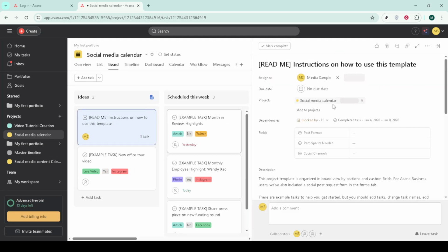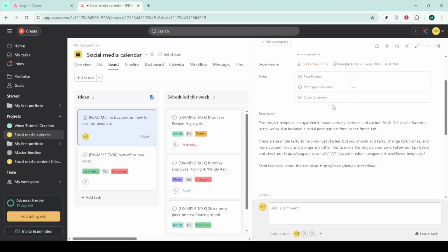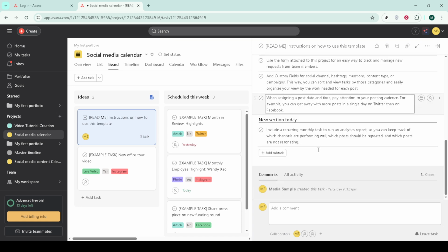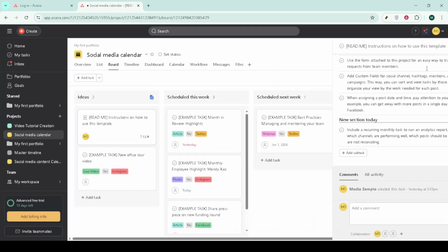Add features or epics as tasks. Break them down into user stories so they're small, testable, and ready to move. If you have a lot of incoming ideas, create an Asana form that feeds directly into your backlog. This keeps requests structured and prevents important details from getting lost.